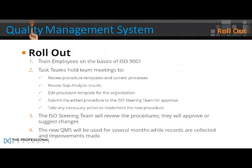Rollout. Step 1: train employees on the basics of ISO 9001. Step 2: task teams hold team meetings to review procedure templates and current processes, review gap analysis results, edit procedure templates for the organisation, submit the edited procedure to the ISO steering team for approval, and take any necessary action to implement the new procedure. Step 3: the ISO steering team will review the procedures — they will approve or suggest changes. Step 4: the new QMS will be used for several months whilst records are collected and improvements made.